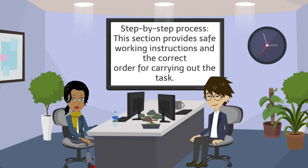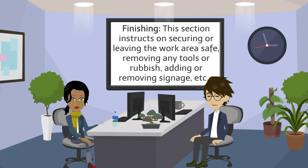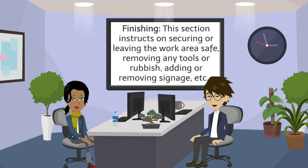Step-by-step process: this section provides safe working instructions and the correct order for carrying out the task. Finishing: this section instructs on securing or leaving the work area safe, removing any tools or rubbish, adding or removing signage, etc.